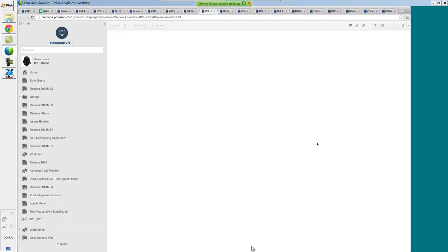So we talked a little bit about information. Estimations are done prior to sprints. They can be done as a preliminary estimation, which is where the overall big epics get evaluated, or during the planning meetings before the work is accepted. It's the team's responsibility to say when they have enough work, so they measure velocities and capacities, and then based on estimations, we ensure that they fill up the sprint with enough work that they can manage.